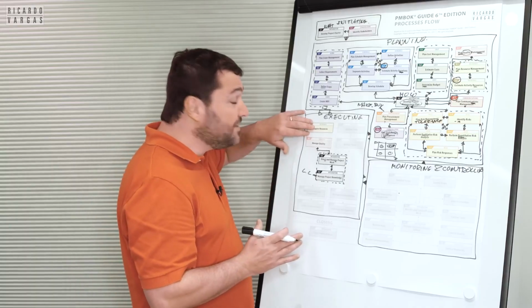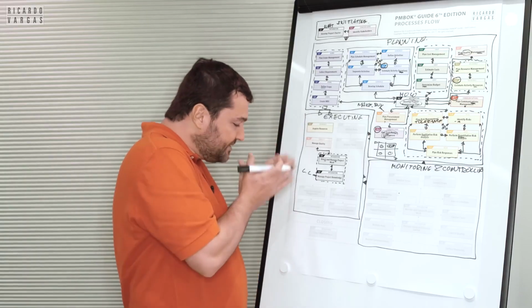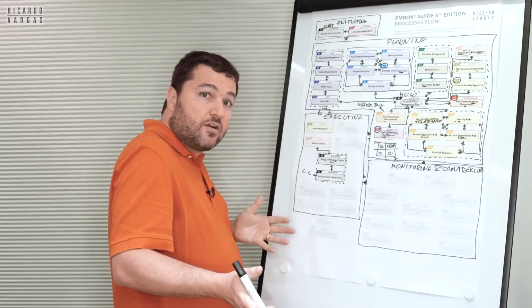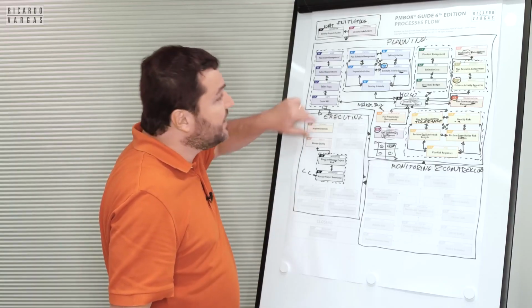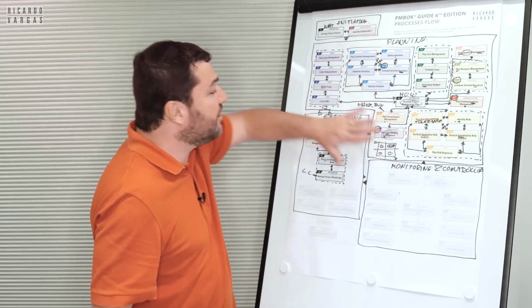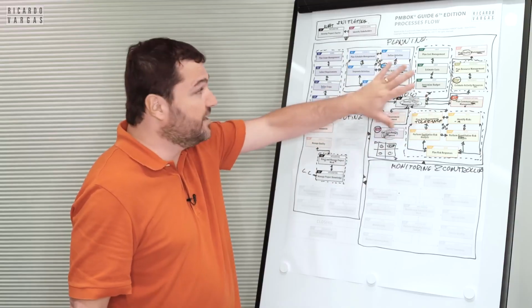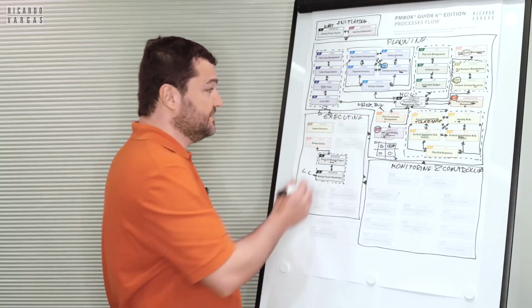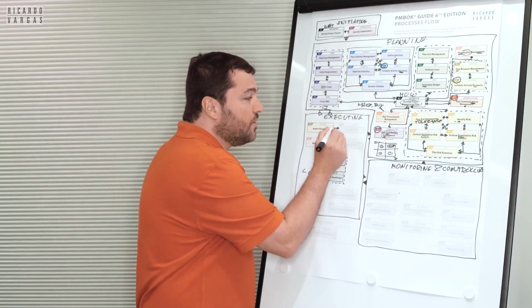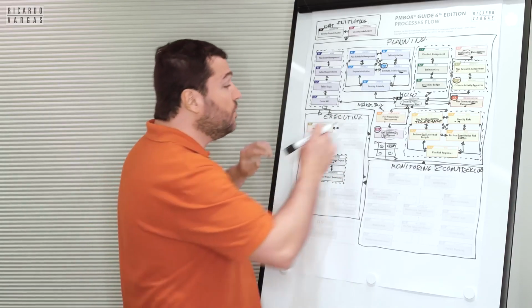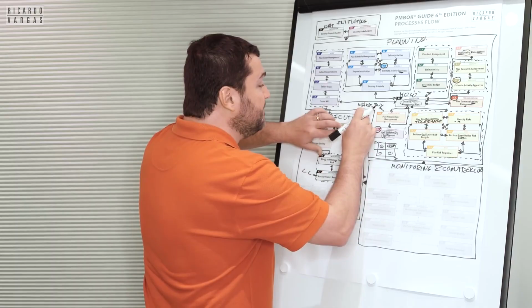So maybe sometimes there is a delay between the time that you acquire the resources and the time they are available for you. So many times you need to anticipate and start some procurement process and some acquisition process here, of course, for obvious reasons. Then, of course, for the human resources you acquired, you will develop a team.